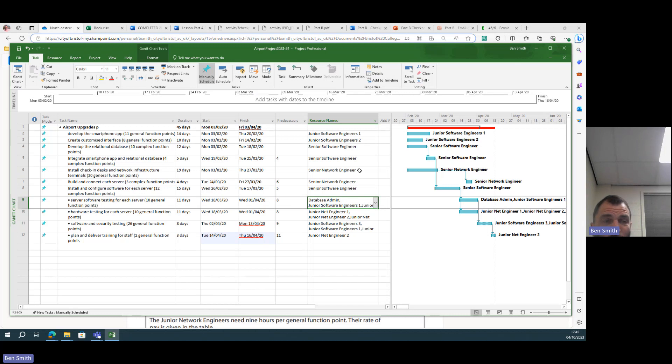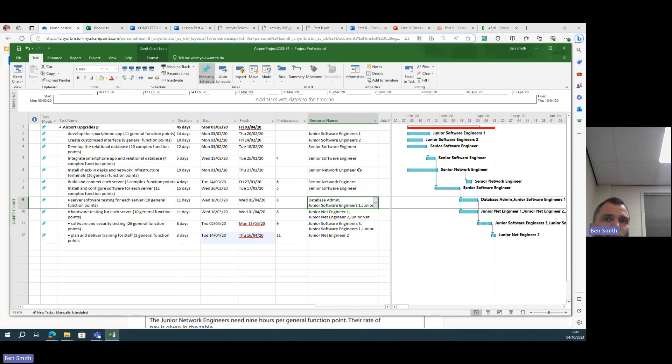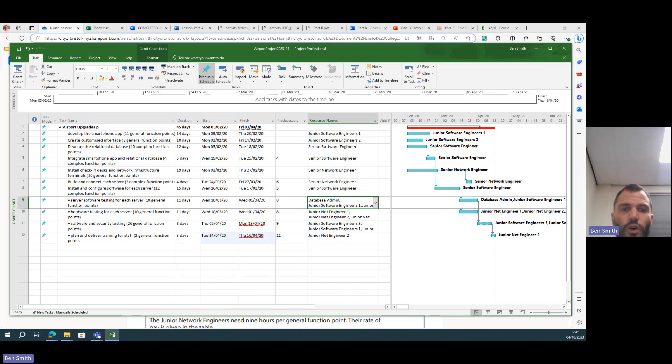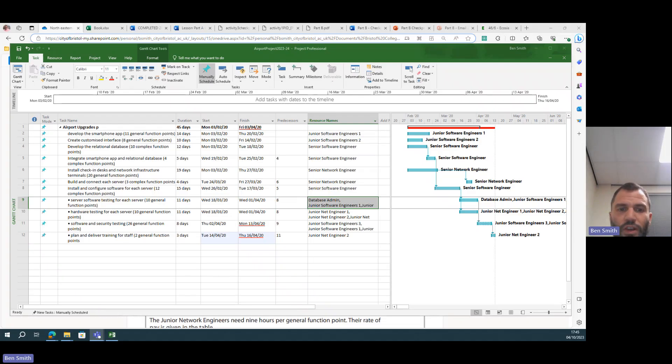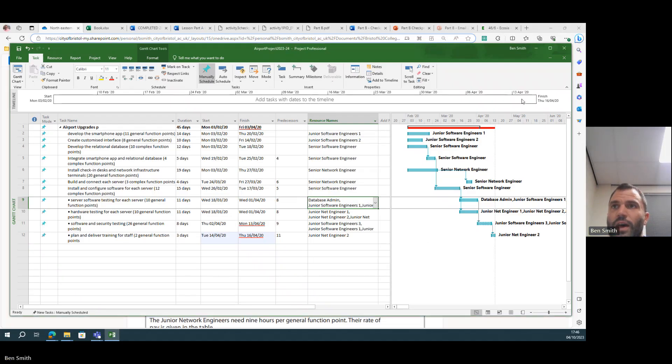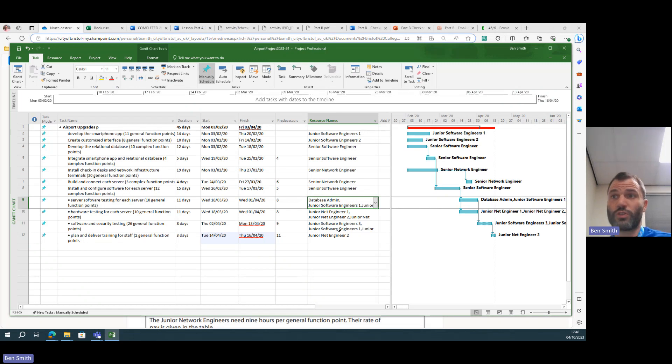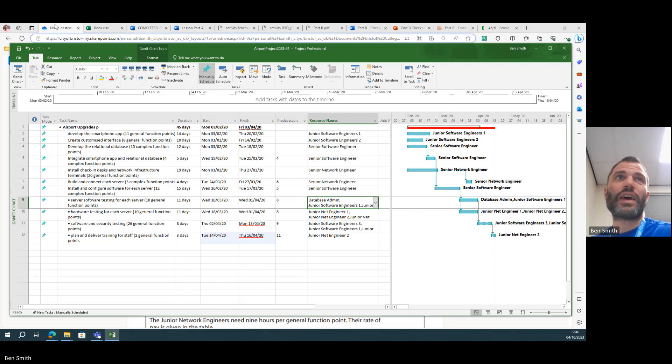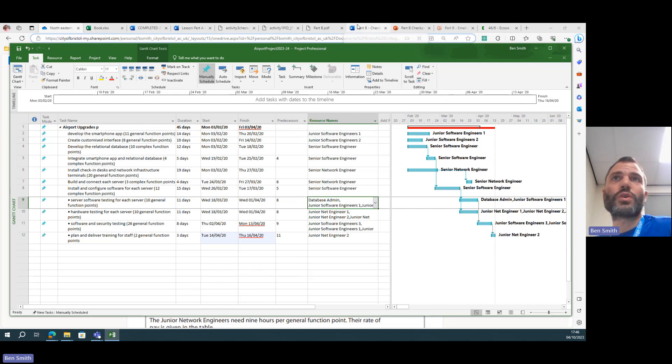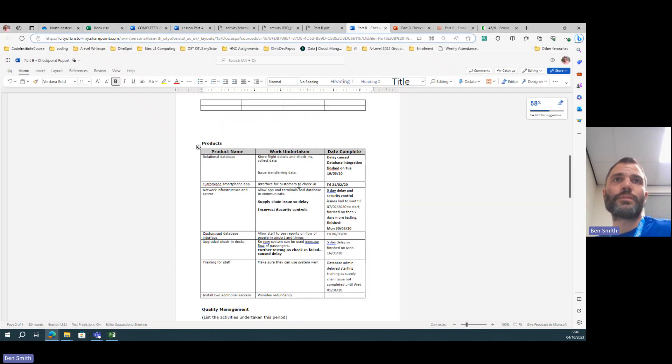I'm actually, oh well I might have to recost that task a little bit because I've got these two are not going—I've got three people on it, but really I'm sharing that money out between, you know, three people. So that's one thing you've got to fix. And that's just how to fix up this Gantt chart so that you can use lots of resources and not overrun too much by the end of the project. And that's okay, because as long as you can argue that in your PID.